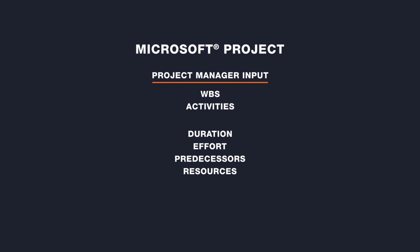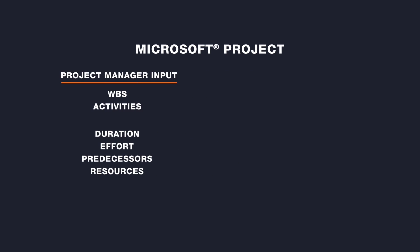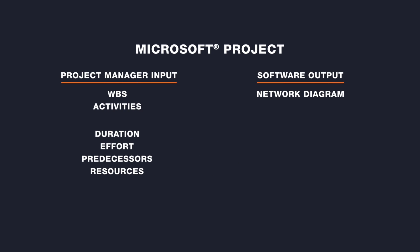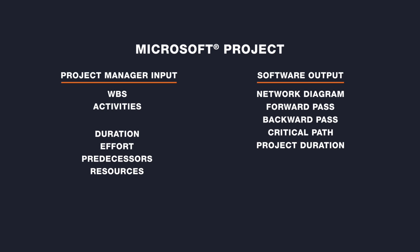And Microsoft Project will automatically create the network diagram and perform the forward and backward paths, identify the critical path, and determine the duration of the project.